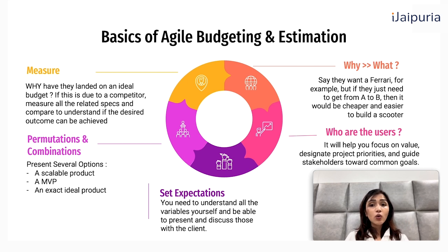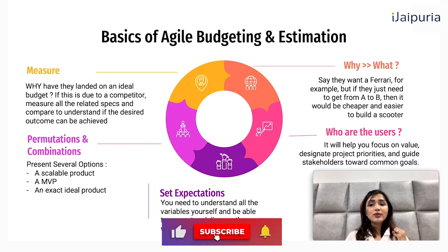You need to understand all the variables, because it happens more often than not that if you ask the client for the money and haven't made them clear of the different variables that you're going to encompass in this project, they will neglect it or push back on your ask as over budget, because they might feel you're trying to extort money out of them. So always be very clear of your variables from the very beginning.